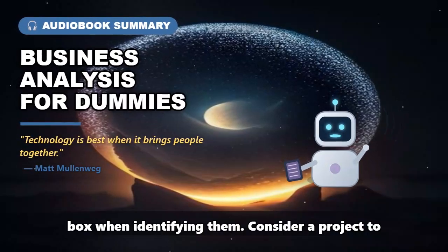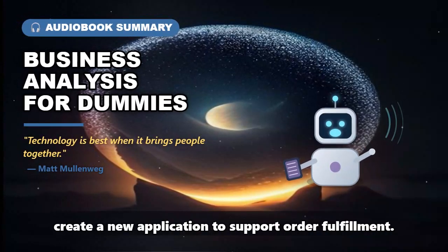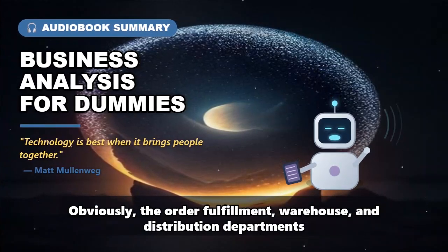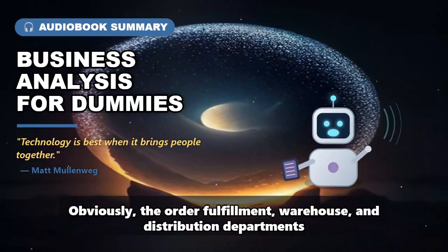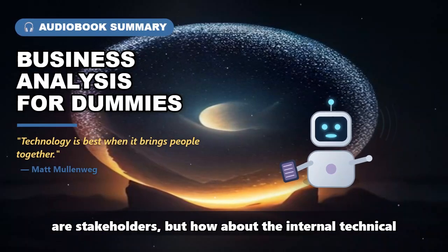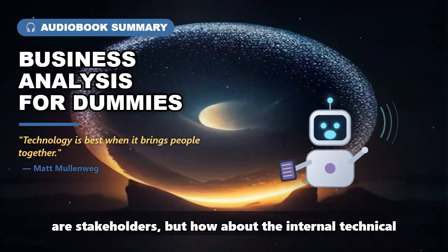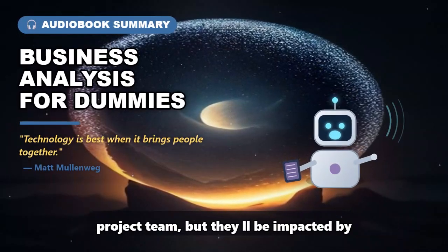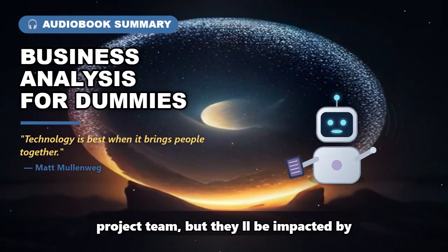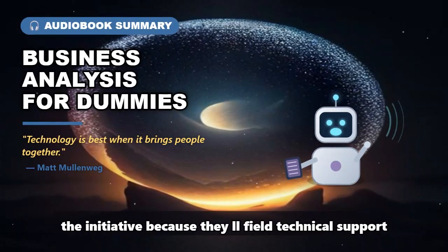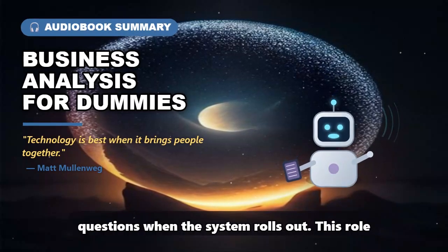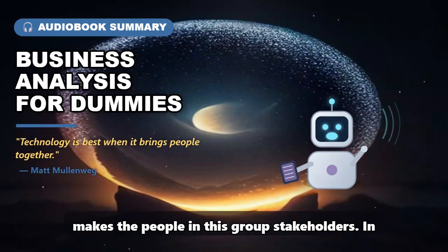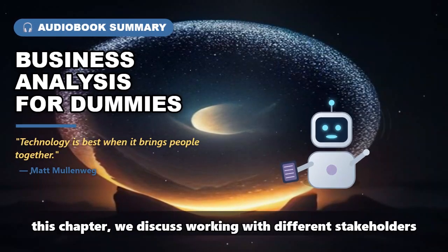Consider a project to create a new application to support order fulfillment. Obviously, the order fulfillment, warehouse, and distribution departments are stakeholders, but how about the internal technical support desk? They aren't part of the project team, but they will be impacted by the initiative because they will field technical support questions when the system rolls out. This role makes the people in this group stakeholders.